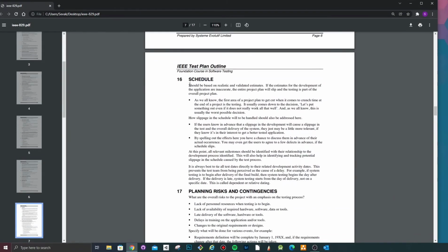The testing schedule is quite important in here as well. So you would be dropping in here things related to the overall timeline of your testing. So when which activity is going to start. If you're working in an agile environment, like you're running Scrum, normally your test iterations will be part of your component level testing and system testing. In part, they will be part of the Scrum activities, part of every sprint, and they will be iterational. But still, you might want to highlight that in here.